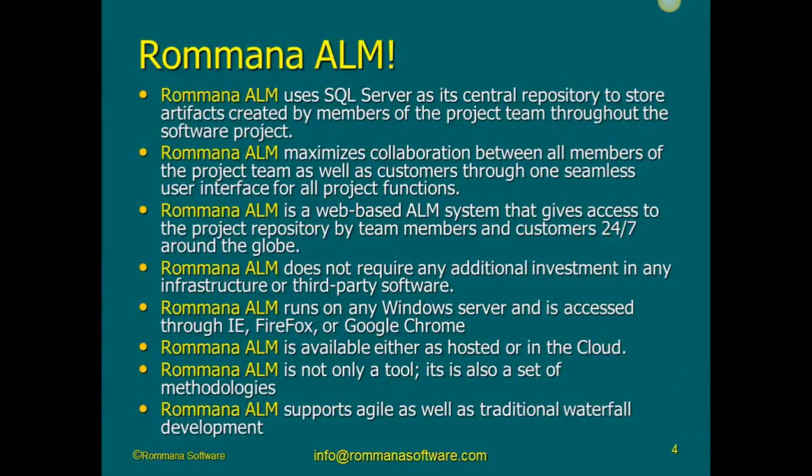When you put your hand on a requirement, you want to be able to see all the scenarios of that requirement. You want to click on a scenario, you can see all the test cases, you can see the ones that passed, you can see the ones that failed, and you can look at how many bug reports were created over time for that requirement, and how many of them are closed, how many of them are still open. You can go backward from a bug report or an issue report, and you can trace it back to the test case, to the scenario, to the use case, to the requirement, and so on. And that's the whole thing.